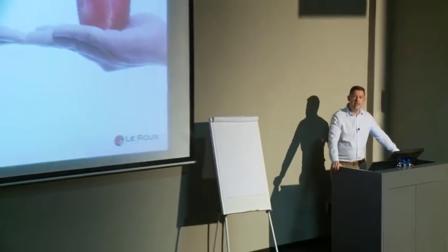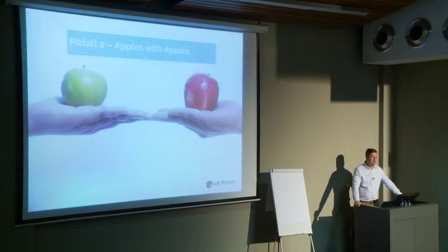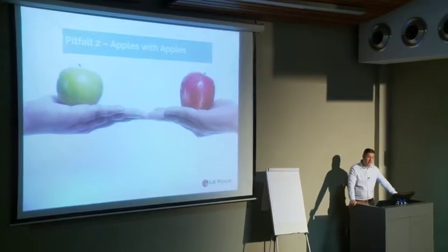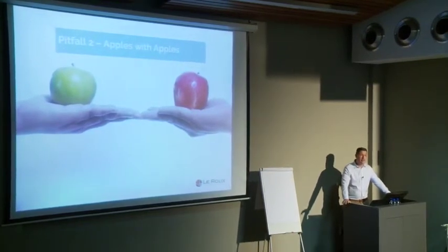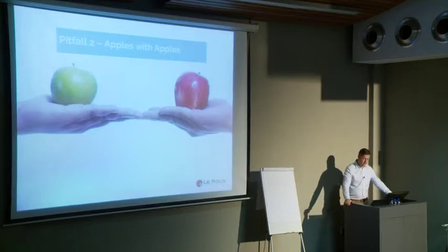All right, second pitfall is apples with apples. We've spent some time with this earlier as well. So in terms of earned value, we can actually integrate any measure with time. That's the essence. We need to integrate something with time. That can be man hours integrated with time. It can be cost integrated with time. It can be length of meters of pipe integrated with time. So as long as we take a metric and integrate it with time, that's the essence of it.